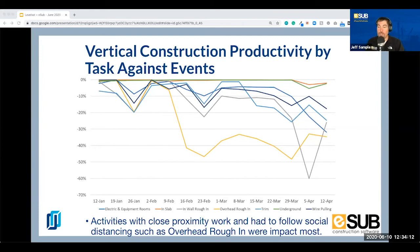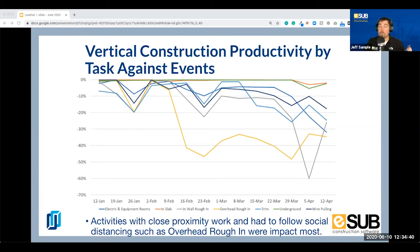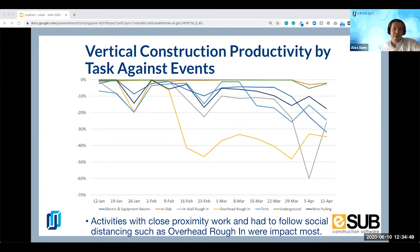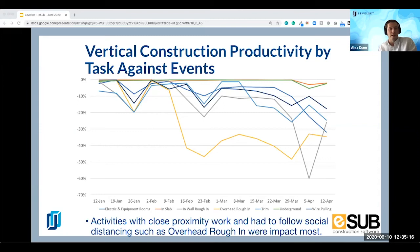The pandemic has a direct impact — there was a period where we had to stop, and now we're back. But consider how that's going to affect us as we try to accelerate a schedule to stay on track or recoup time. You're going to have trade stacking, overtime — things that weren't in your original schedule that are going to create a cost impact. You've got to quantify them and continue to measure them. You also have to really communicate them. Getting those change orders approved, having the written paper trail, having the data is great — but until you go to the hiring party and say, 'Here's the change order, here's the pay app, here's the lien waiver' — getting those things approved and communicating up the chain is so important.